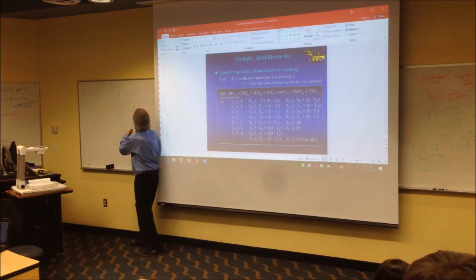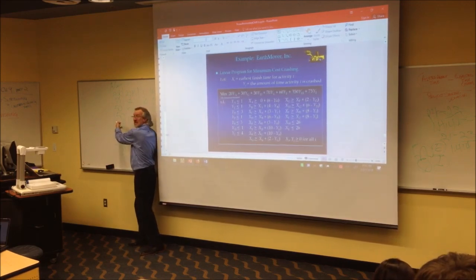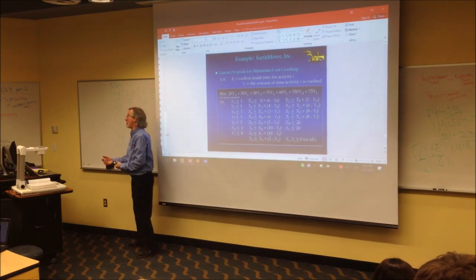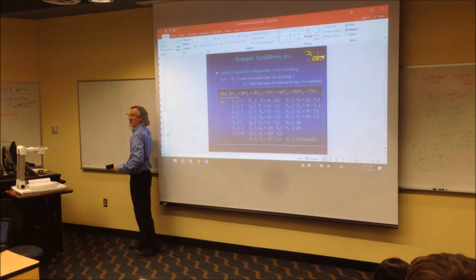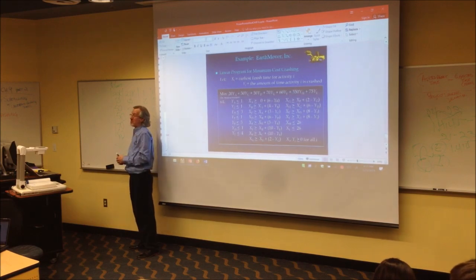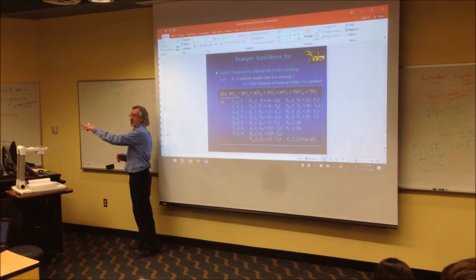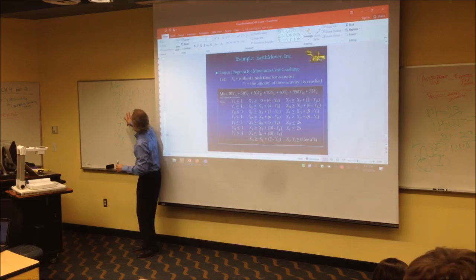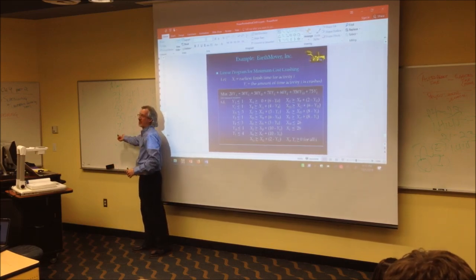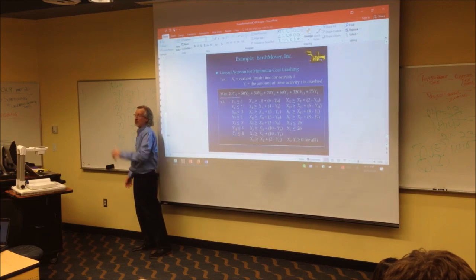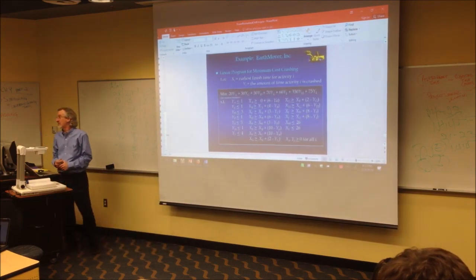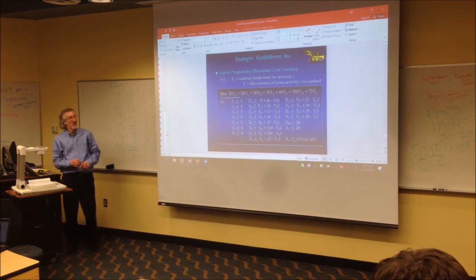He's saying if you only crash 1, maybe it's only going to cost you 50 or 40, but if you're crashing 2, they need 60, a different amount for each one. You almost got to treat it like it's a separate activity in a way. In most cases, I have not experienced that, but I know it could happen. In my experience, it's always been a flat amount that we would then divide by the number to get a regular amount. But I see your point. You wouldn't be able to do it this way, even though I have not experienced that happen with any subcontractors I've done.